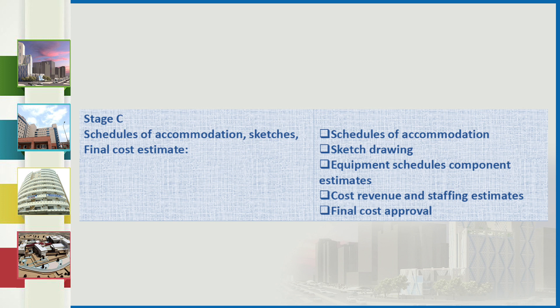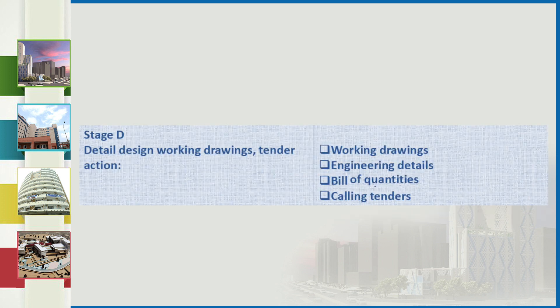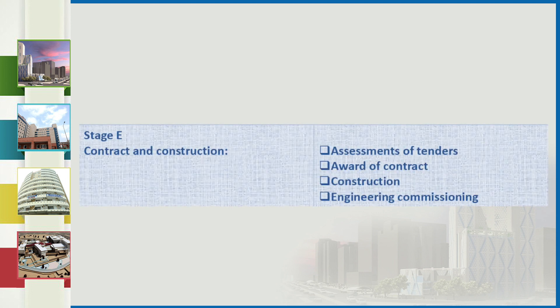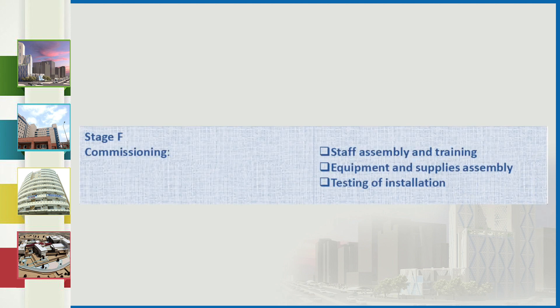The next stage is the schedule of accommodation, sketch drawings, and final cost estimate, including equipment schedules, component estimates, cost-revenue and staffing estimates, and final cost approval. Then comes the detail design and working drawings stage with engineering details and bill of quantities, followed by calling of tenders. After that is the contract and construction stage — assessment of tenders, award of contracts, construction, and engineering commissioning. This is followed by the commissioning stage (staff assembly, training, equipment and supply assembly, testing) and finally the shakedown period with post-occupancy evaluation.